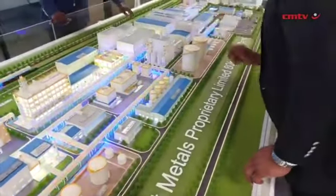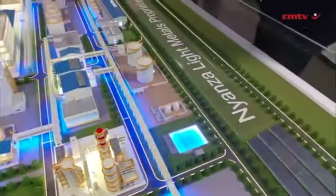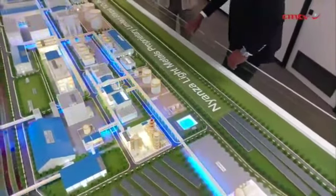They could provide an EPC lump sum fixed turnkey price, which is very critical for lenders when you're doing a greenfields plant, because we speak about cost overruns and whether the funding is enough. So if you can settle the dust on the cost to build the plant and get a guarantee around that, that helped us move quite significantly. And having them as an EPC contractor, also as an O&M contractor, so they'll operate the plant for 5 years. Over and above, they're also injecting equity as an industrial sponsor.